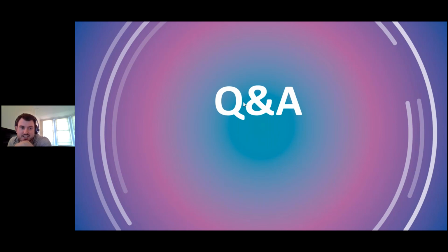So the first question asks about things like coordinates, origin points, and those sorts of items. And this is why I talked about the importance of the relationship between the information standard and the information production methods and procedures, because the information production methods and procedures should talk about perhaps how coordination is done, and then that would actually maybe go through whether you are selecting a 0,0 origin, or you want to put in some form of real world coordinates or similar, and it would go through the procedure of maybe doing that.